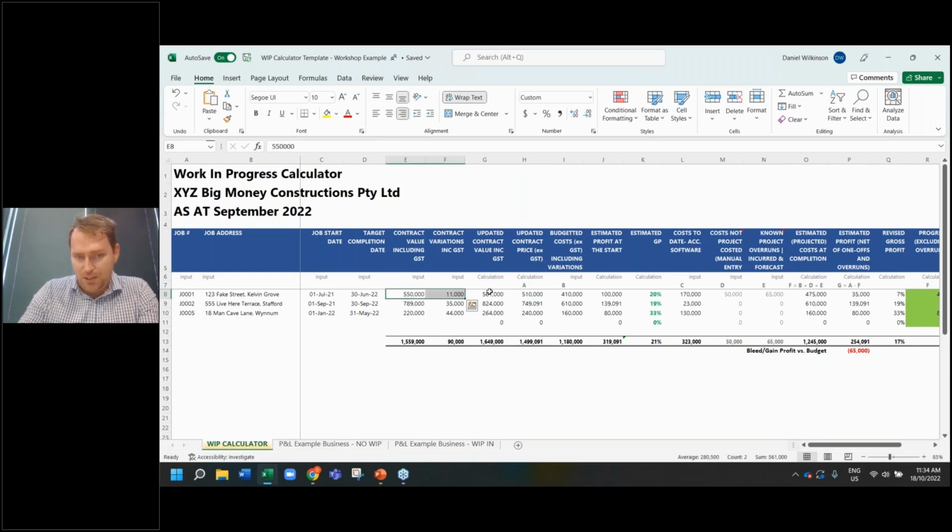Basically it just sums these two together, divided by 1.1, gives you 510,000, because unfortunately we don't get to keep the GST, that goes to the government. I'm planning to spend $410,000 on the build all in, so I'm planning on making 100K. Let's defend it and look after that as best we can. Over the side here, this project's running at a 20% GP. So this one must be an architecture design home, and this one must be a reno, just given the GP at the bottom.